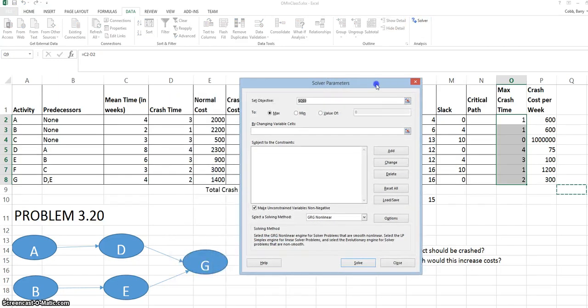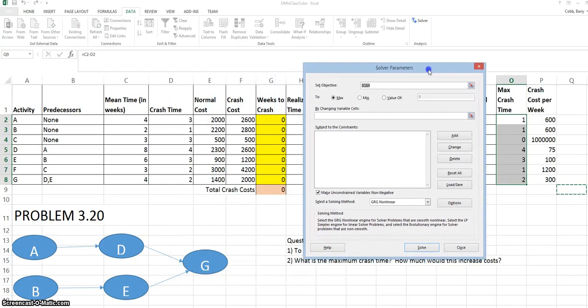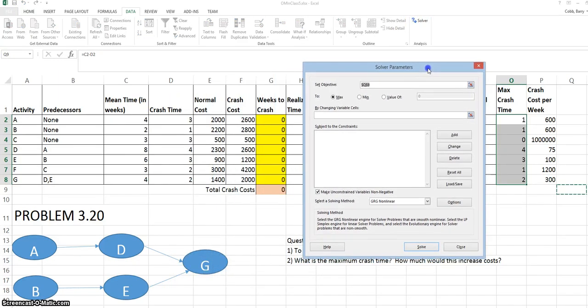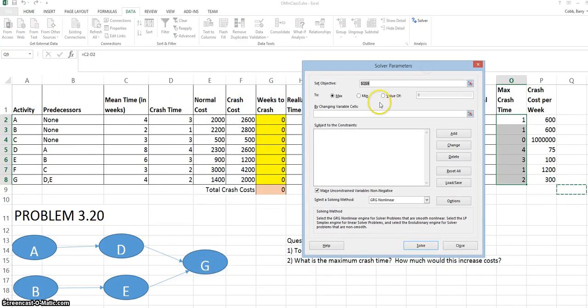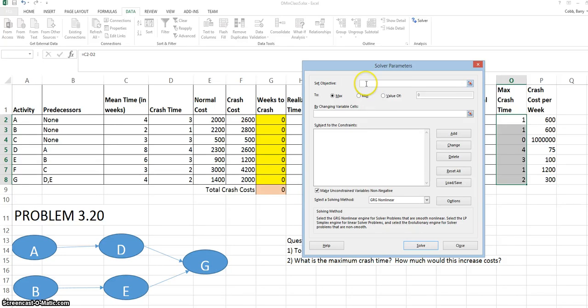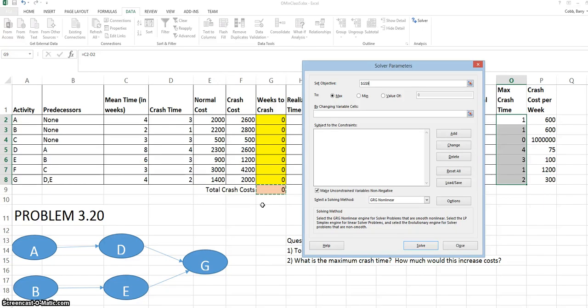This is the solver window. The first thing we set on the solver window is the objective. So we put the cursor in the objective box. In this case, click on the total crash cost. Our objective is to minimize total crash costs that still meet the deadline. So we need to select the button for minimize.